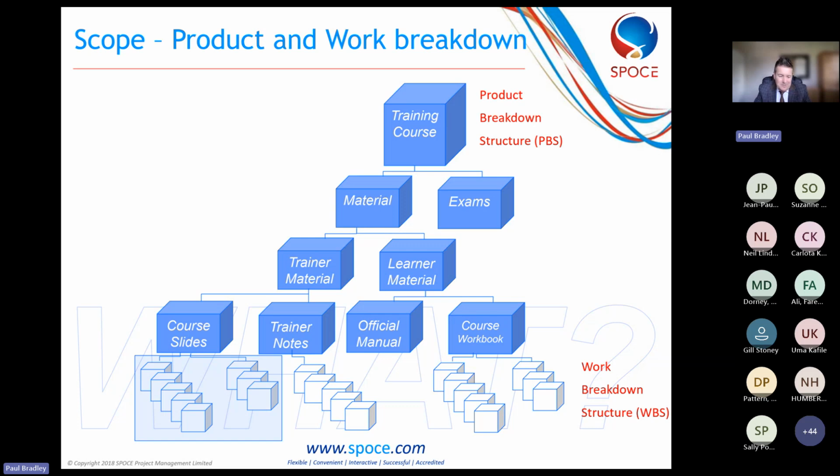So what I'm going to do is, to produce the course slides, I'm going to put all those activities into a work package and give it to one of my developers. I've got another work package there that covers the trainer notes, and I've got another work package there. So 3 work packages altogether to deliver and develop those course materials. It may well be I just put the whole thing in one work package. It depends what way you want to break it up and delegate it, and that works really well. What you will notice,